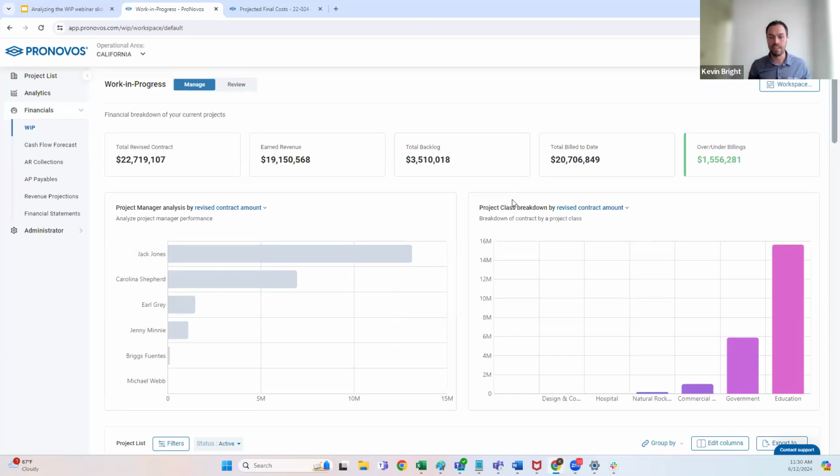But it's good to pull up to that 10,000 foot level and say, hey, how are we performing as a company? So I can look at this here and say, hey, we're doing pretty good on our billings. We're $1.5 million underbilled. On the flip side, I can see we only have a total backlog of 3.5 million against a total contract amount of 23 million. We're really going through that backlog, and I better get out there aggressively, win more work, or in a couple months, we're going to be in real trouble when we've exhausted that backlog.